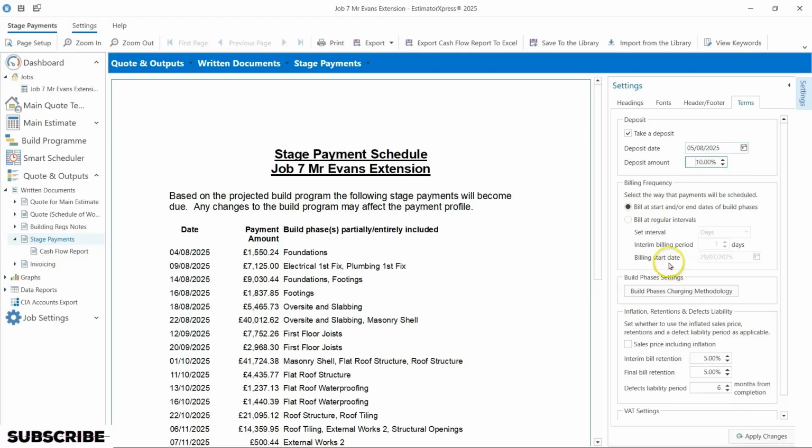It's perhaps important to note that the deposit you take will need to cover the cost of the first few phases of the job. So it's important the deposit amount is set at a relevant figure where it will cover all your costs of this first few weeks or perhaps even month of the job. In this, for instance, I have selected 10%. This will ensure more than enough is collected to cover the first few stages of the job and leaves you comfortable in terms of the ongoing costs for the job, payments to your staff, and indeed materials required for the job at hand.